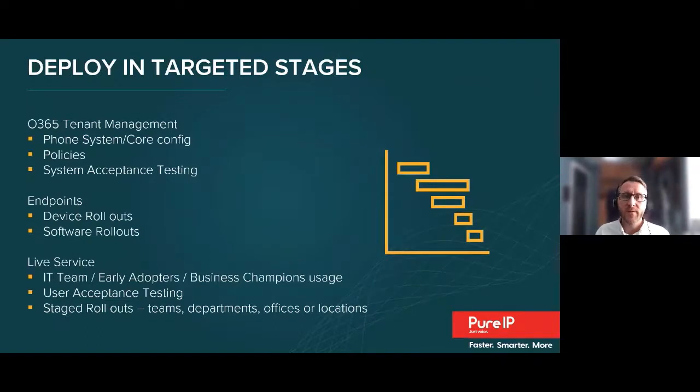The design phase should have defined and assessed the plan for migration and deployment. There are a number of ways to perform this, including integration with the old solution, coexistence, or brand new greenfield approaches. Since direct routing allows you to utilize your existing number ranges, carriers, and in some cases SBCs, you may be able to deploy in focused batches, balancing the users across both old and new services at the same time. If there are carrier moves and number porting involved, then it will be well worth completing the initial stages of Teams voice configuration and direct routing to allow pre-port testing on new numbers.